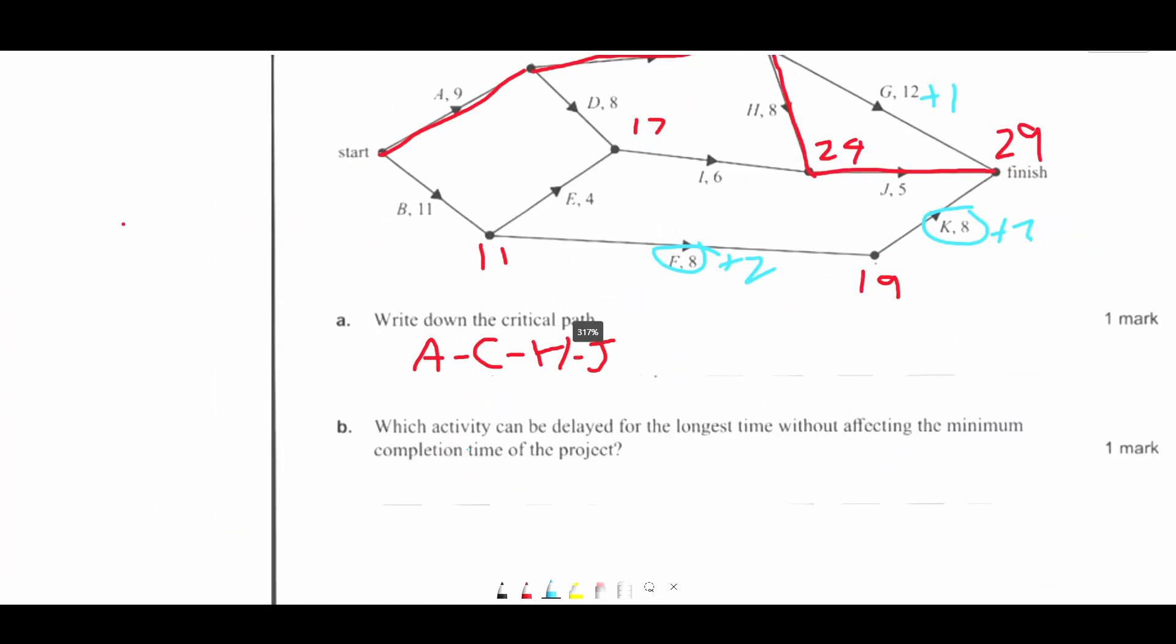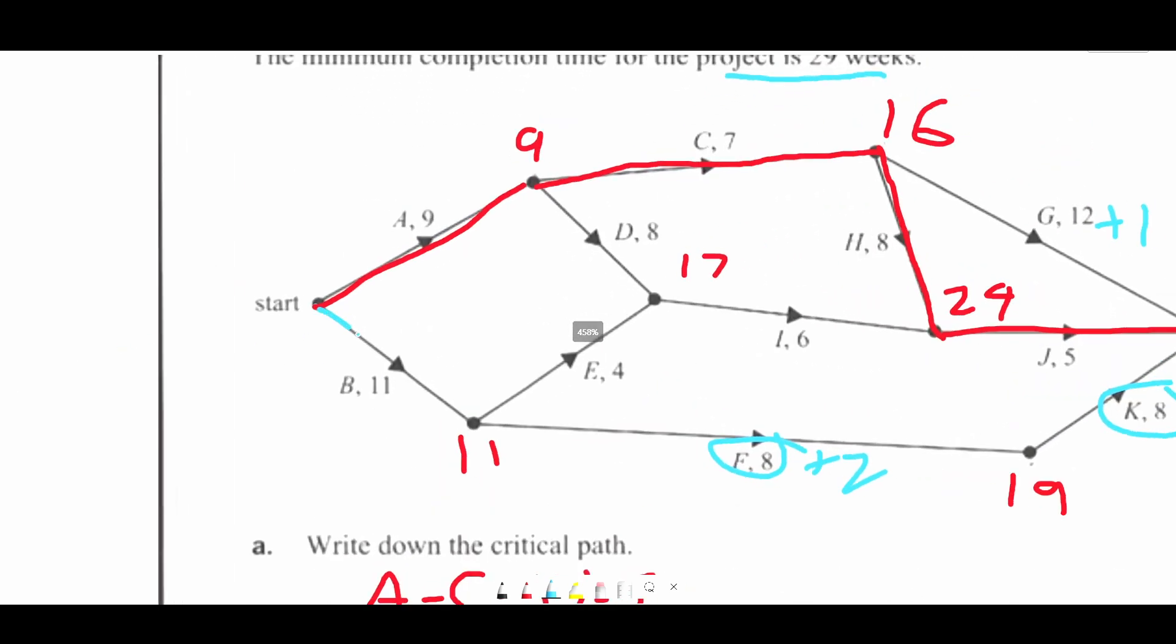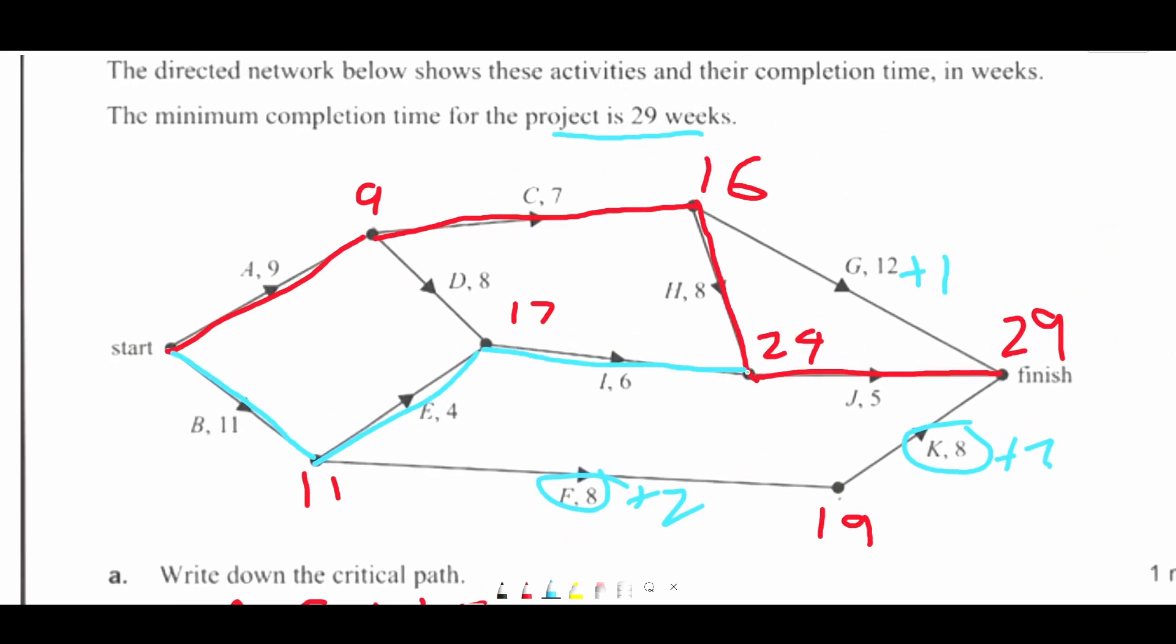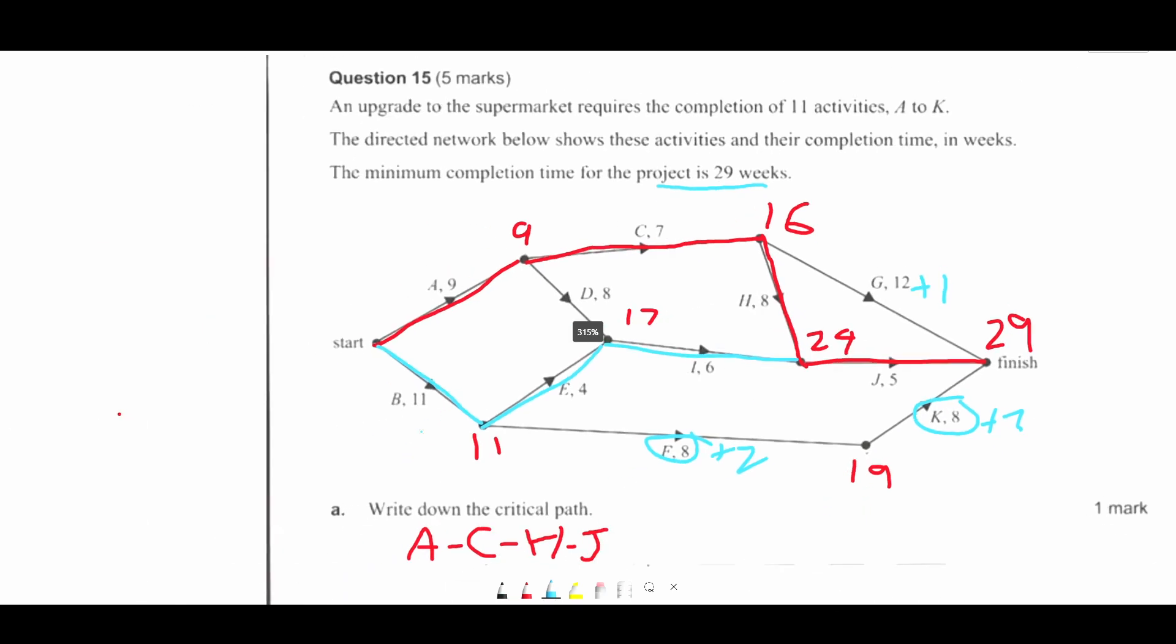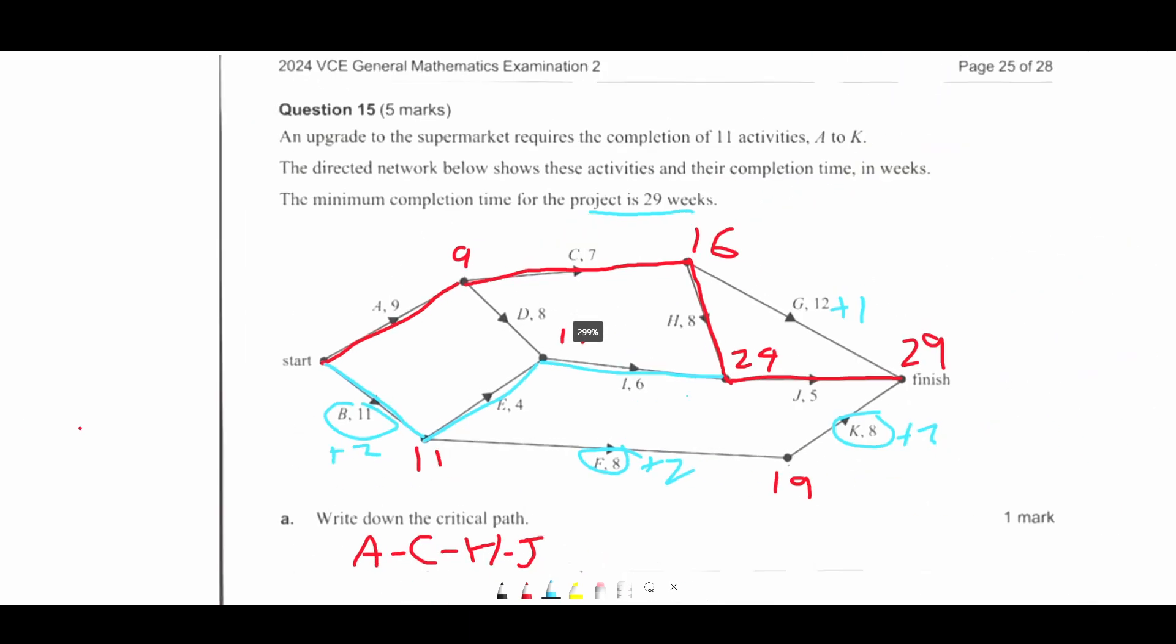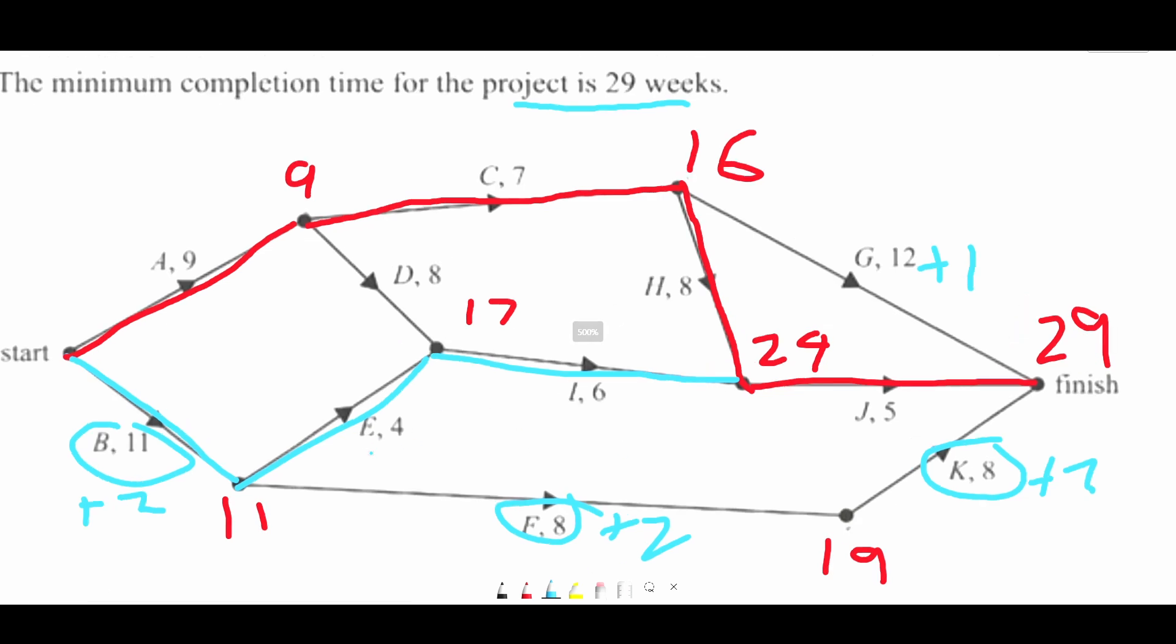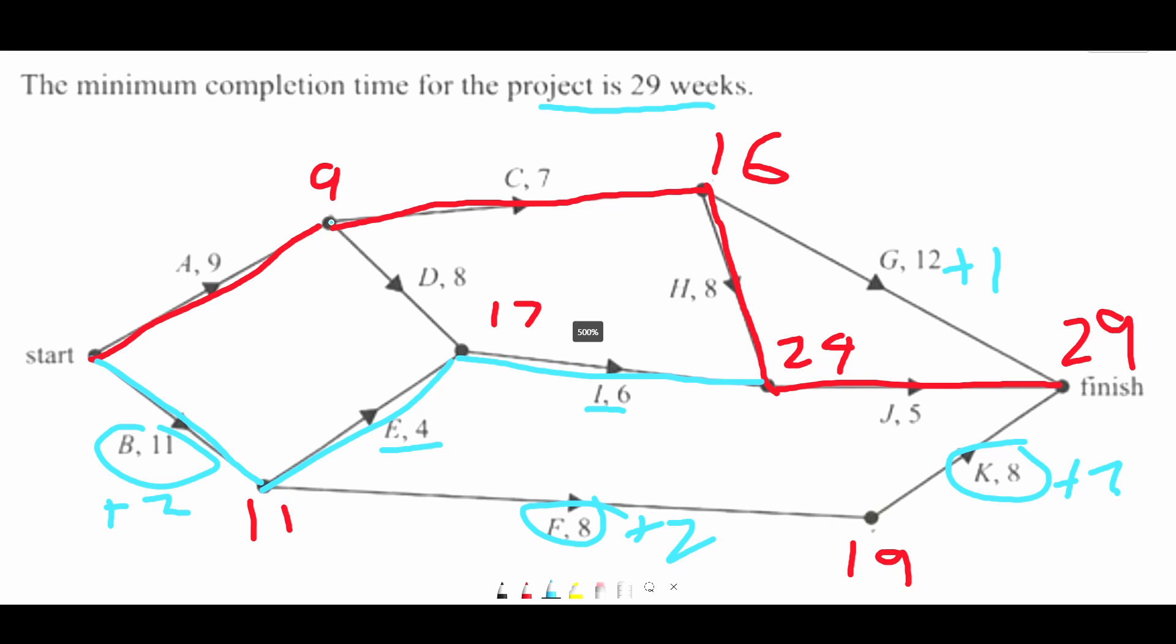But the question is saying which activity, not which activities. So it can't be those two. B down here is 11, 15. 15 plus 6 plus 5. That equals 26. So we also know that this can also be increased by plus 2. But when we're going down here, one of these activities can be increased by plus 3. It's either this one or this one. So 11 plus 4 is 15.